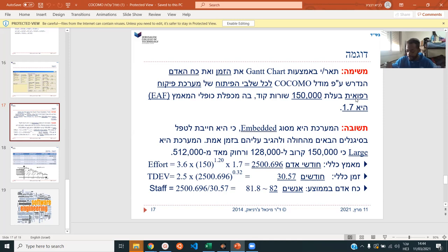For each stage of development, show how many people and how much time you need to do this project. It's going to be a system for medical observation — some kind of medical supervision system. Like, you have a patient in a bed and it's checking all his vital signs, observing and maybe telling the nurse that he needs more vitamins. We're given 150,000 lines of code — that's 150 KLOC. And we're given the EAF, which is 1.7.